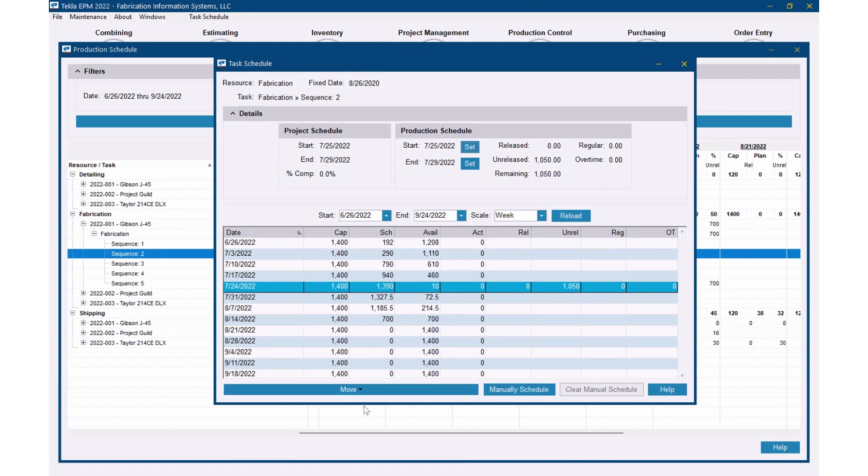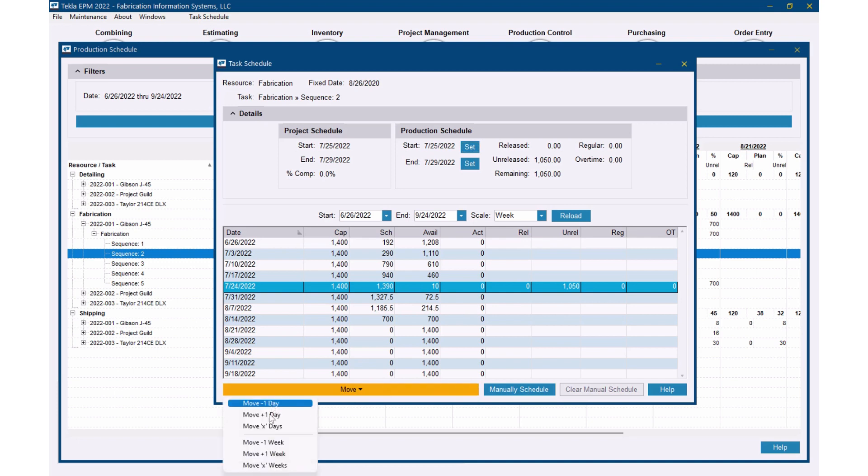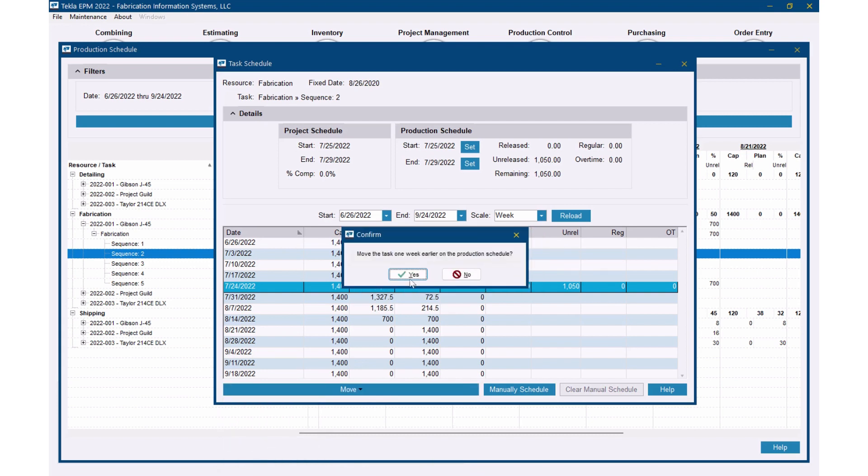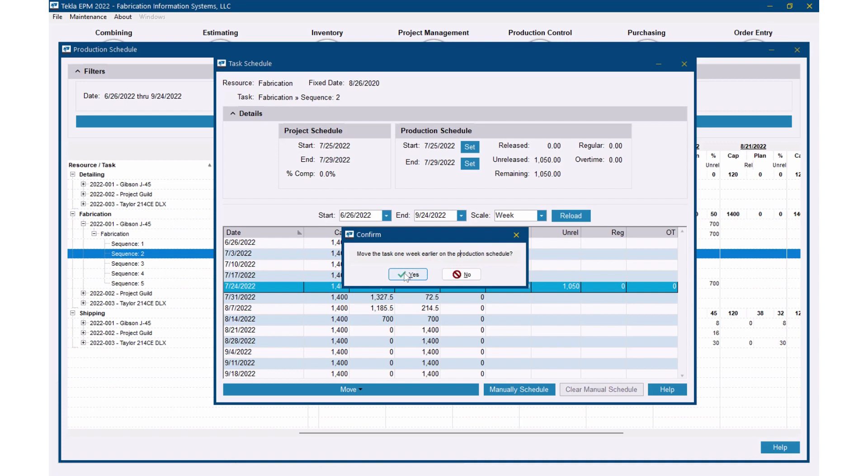I can take this right here and I can move that back a day, up a day, back a week, up a week. So if I move it back a week, move the task one week earlier on the production schedule. Notice this, on the production schedule it doesn't affect the dates on the project schedule, by the way. So if I was going to push this out, I'd certainly want to talk and make sure everybody knows that that's going to push out and it might affect the ship date. So if I'm going to push this out, I'm probably going to go back to the project schedule and do it not on the production schedule.